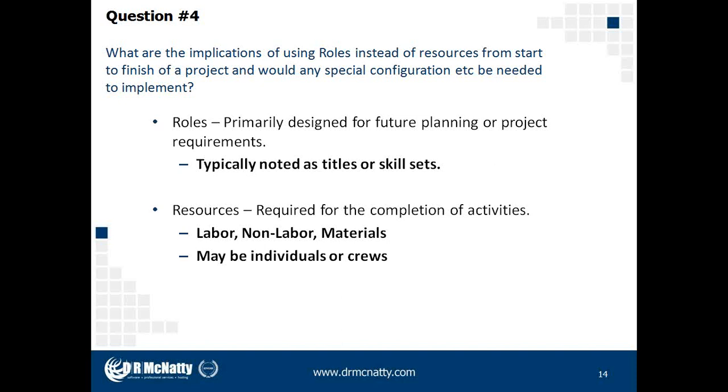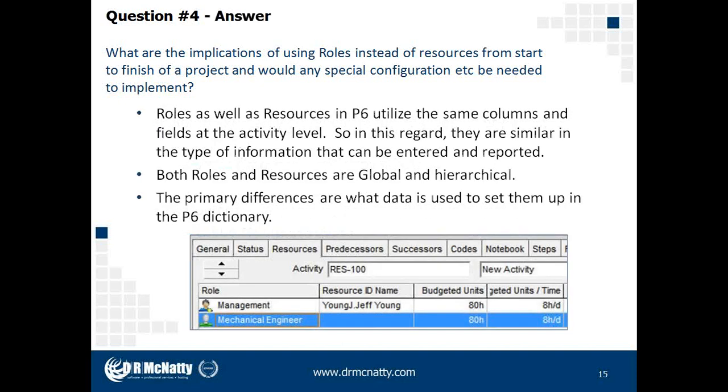And so the resources can be any labor, non-labor, equipment or materials, and can also be down to the individual or crew. So the resources in P6 are perhaps a lower level, a greater level of detail than what we have in the overall role dictionary. When we look at roles and resources in P6, there are probably more similarities than differences.